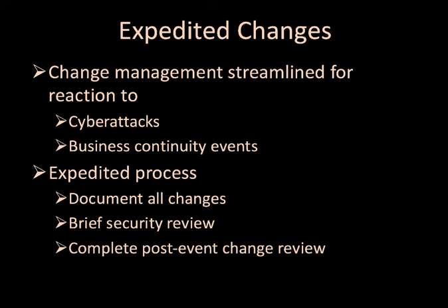For example, if a system fails because of an unexpected software failure and a business process fails, the developers and database admins are expected to quickly repair the app and ensure data integrity. The repair analysis might take about an hour, and a repair ready in another 30 minutes. However, the change management process might take up to 4 hours. This is not usually acceptable.